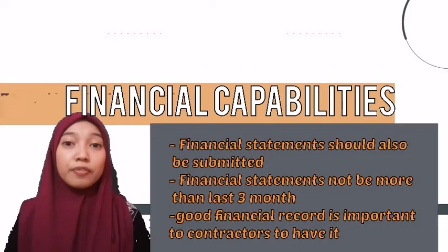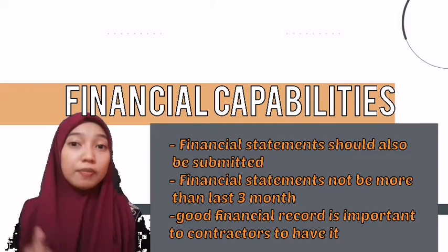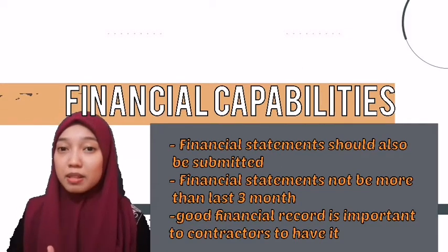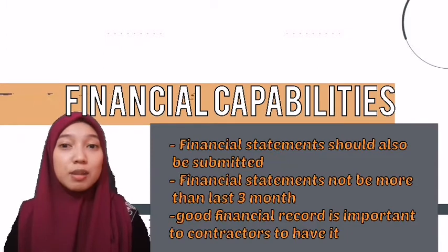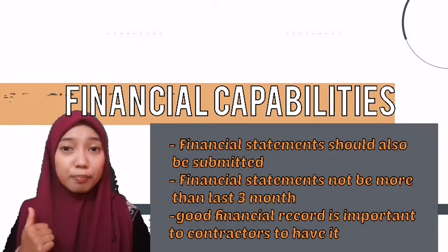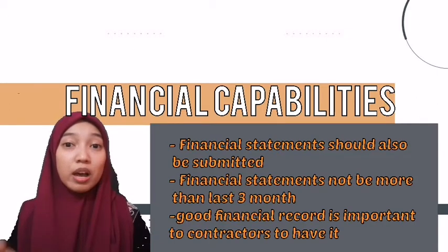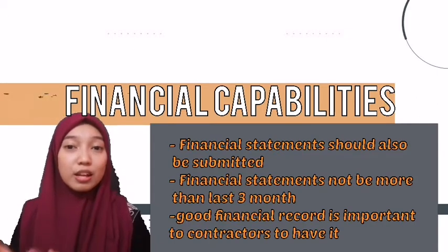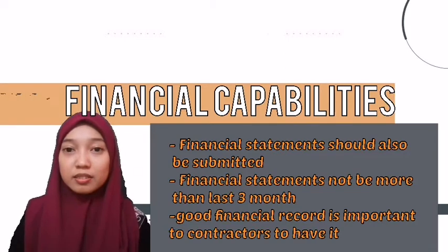Financial capabilities of the tenderer will be evaluated. A financial statement should also be submitted for evaluation. The financial statement should not be more than the last 3 months old. This is important for the contractor to have a good financial record so that they can finance the project.